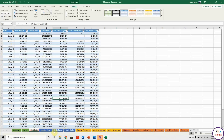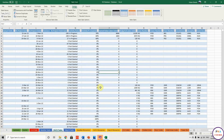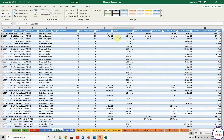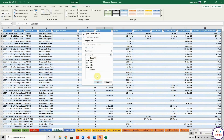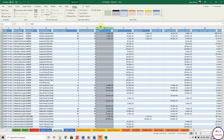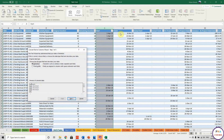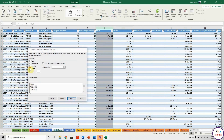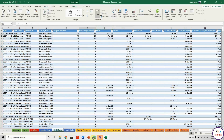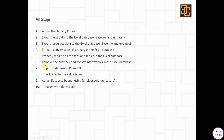When you copy and paste data from Primavera to Excel, some start and finish dates may have actual or constraint symbols — either a letter 'A' or a star. To remove these, insert one column after the start and one after the finish. Then go to Data, Text to Columns, choose Delimited, click Next, check Space and Other, put the star symbol, hit Next and Finish. Make sure all your dates are recognized as dates — this is how you remove the constraint symbols.